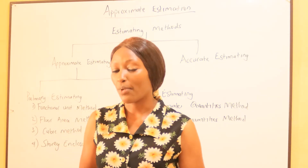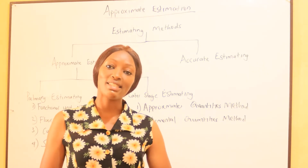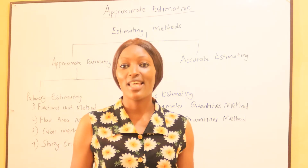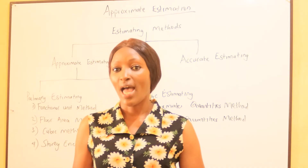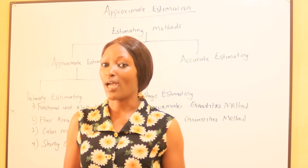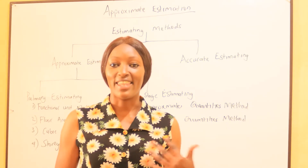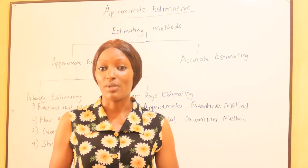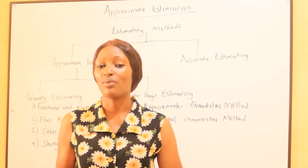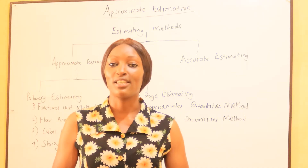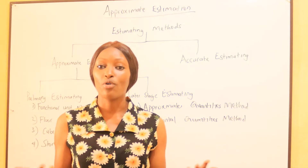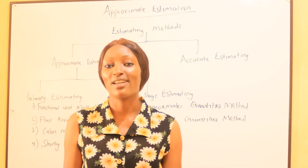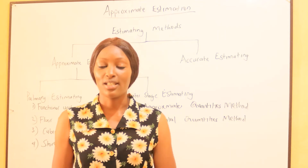In this video we shall come to realize that there are methods that quantity surveyors use to do approximate estimations, and these methods give answers within the shortest time possible. We have already talked about the Bill of Quantities — this is a method used for accurate estimation. The Bill of Quantities is used when entering into contract between the contractor and the client, so it has to be very accurate. We look at every item by item together with the specifications, and pricing is according to specification — for example the concrete ratio 1:1:2:3, or mortar ratio 1:3.